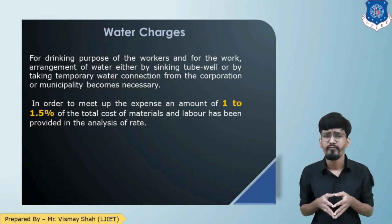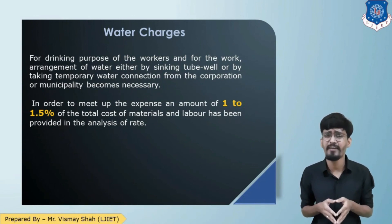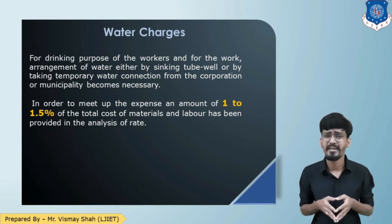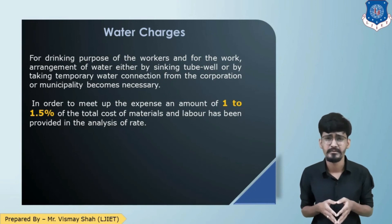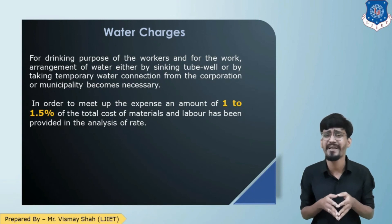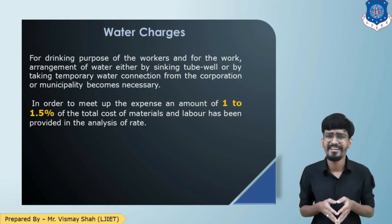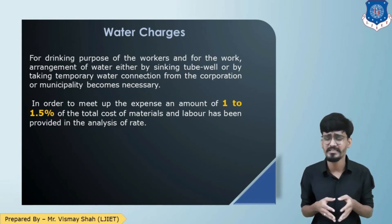The next is water charges. For drinking purposes of workers and for construction work, the arrangement of water — either by sinking a tube well or by taking a temporary water connection from the government — becomes necessary. In order to meet such expenses, 1 to 1.5% of the total cost is provided as water charges in the analysis of rate.